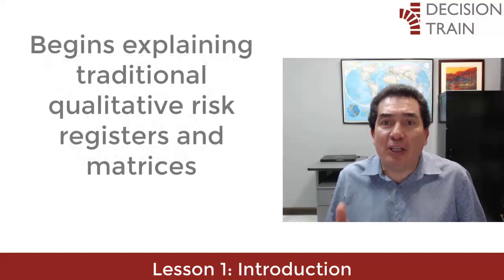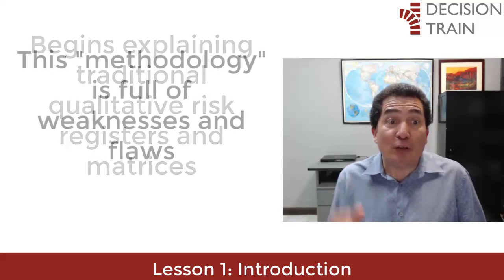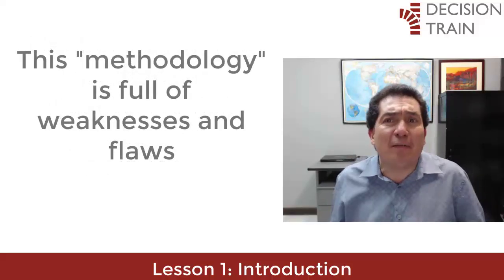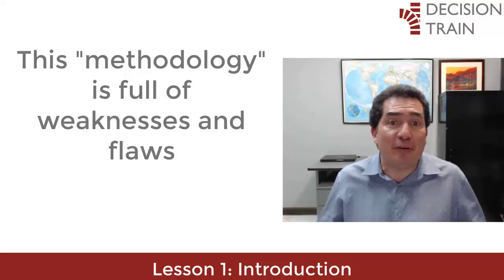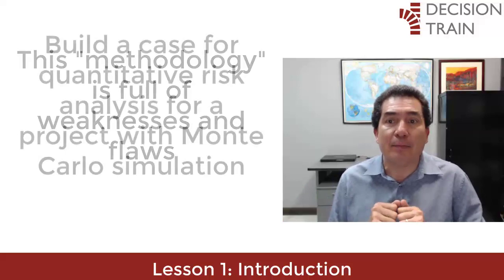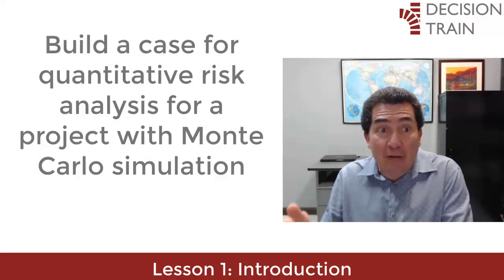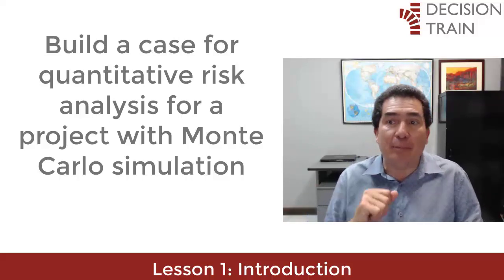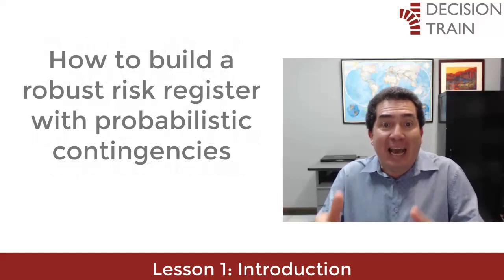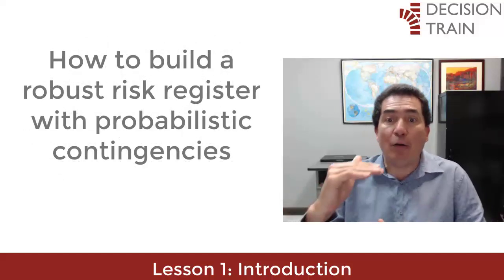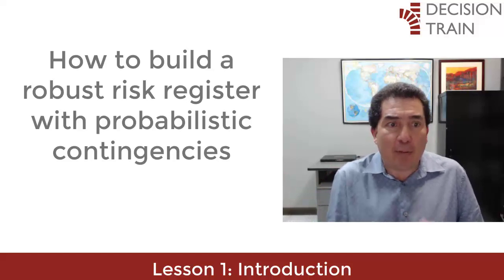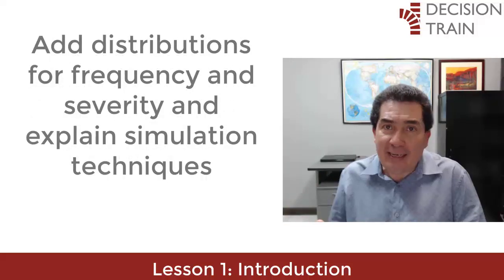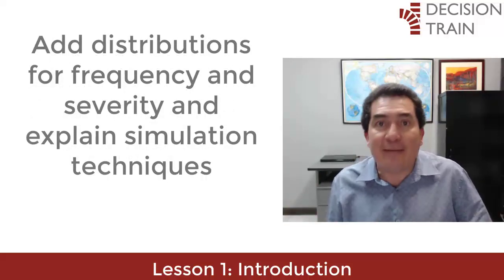This course begins by explaining traditional qualitative risk registers and matrices, and why this methodology is full of weaknesses and flaws in its attempt to use frequency and severity components to build a risk analysis. In comparison, we carefully build a case for quantitative risk analysis using a Monte Carlo simulation approach. Throughout the lessons, we add all components needed to build a robust risk register capable of building probabilistic contingencies in a project, using appropriate distributions for frequency and severity.